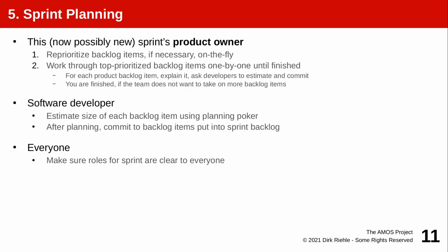Yes, no. And if the team says we can do that, it is moved into the to-do column for planning, for pickup by the development team. This way you fill the to-do column until the development team says they don't want more work for the upcoming sprint.